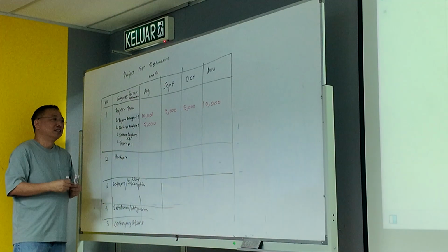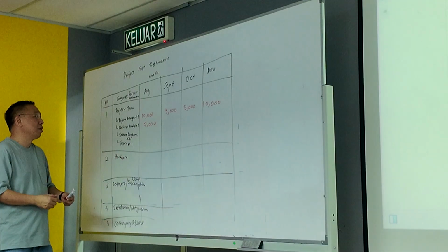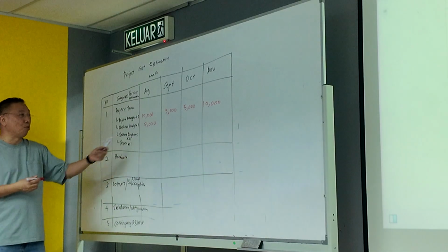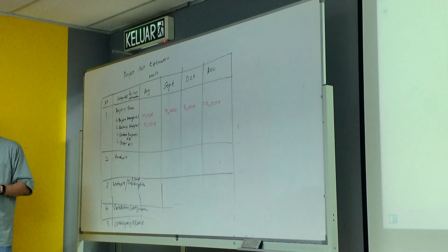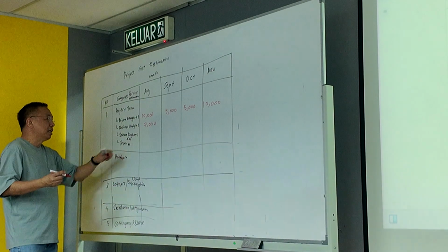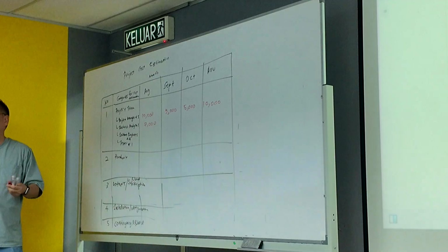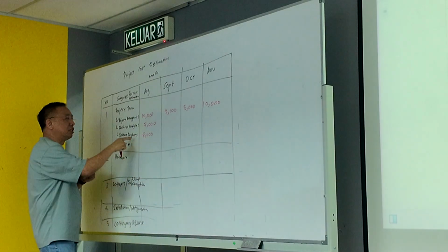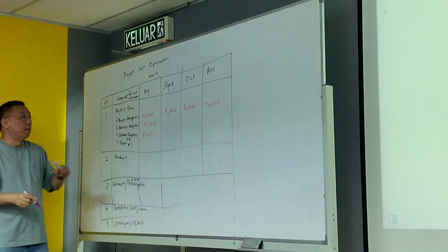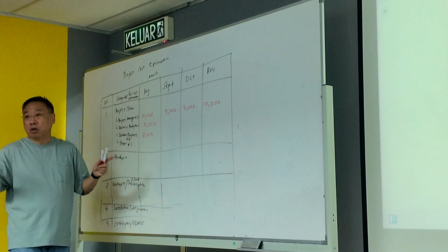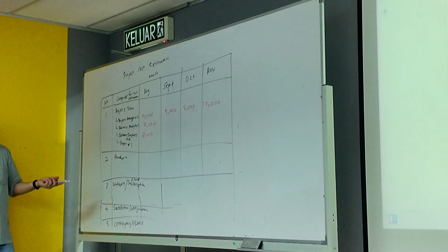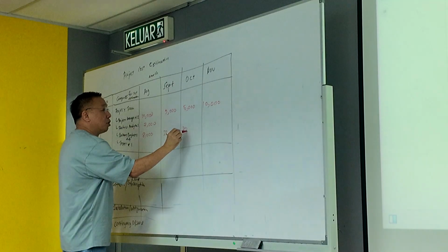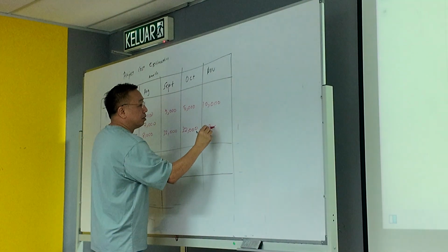Okay. Software engineers. I think after he collects the business requirements, does his analysis, does some of his design, maybe I need one software engineer the first month to help him with the design part, right? Because he's done the requirements. And let's say that each software engineer is $8,000 a month salary, okay? So I'll put $8,000 here for that one software engineer in the first month of August. But September, October, November, I need all 4 because there's a lot of development work to be done, a lot of coding to be done. So 8 times 4 is $32,000. Because these are all salaries I have to pay a month, right? 32,000.